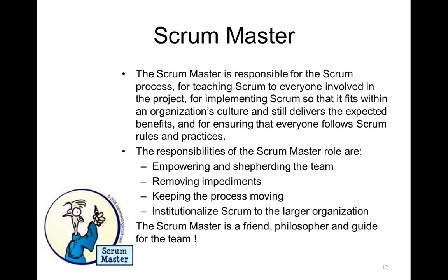Interestingly, it must be noted here that the Scrum Master is not part of the team, in the sense that the Scrum Master is not part of the team's commitment. The Scrum Master is not making the commitment; the team makes the commitment. So the Scrum Master provides all inputs, all guidance, all support to the team so that they make the right kind of commitment and are able to meet that commitment.